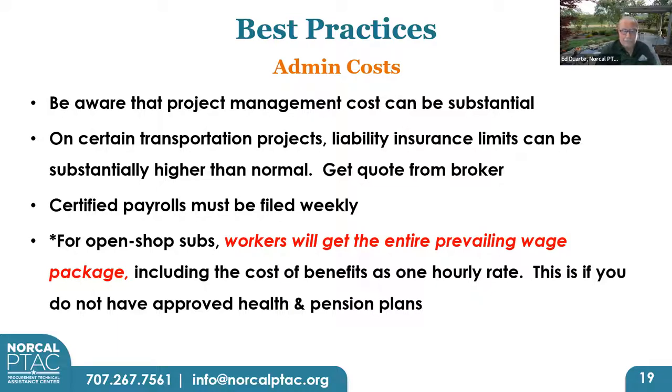There's no need to get panicky around. I mention that because I hear that all the time from the smaller contractors. They say, how the heck can I afford a $10 million liability policy? You don't have to. You're not going to buy it unless you get the job, number one. And when you do get the job, you better have the quote for the writer in your estimate.